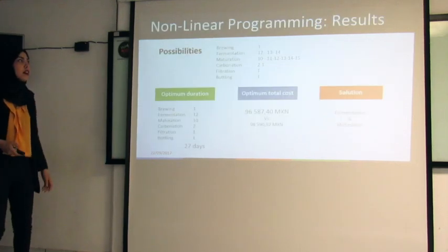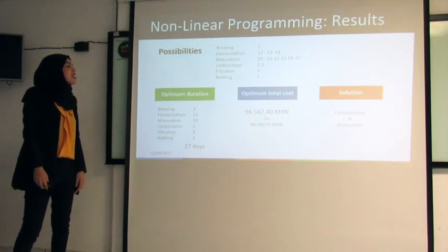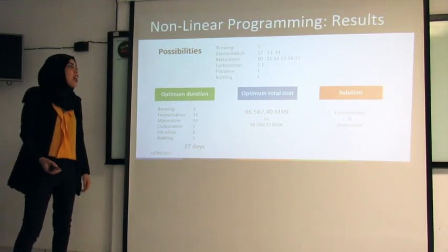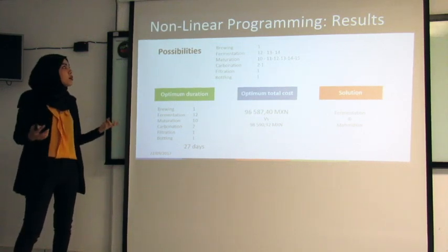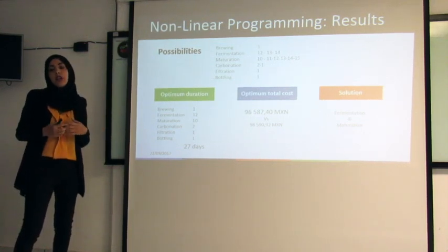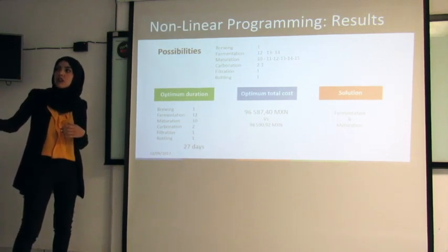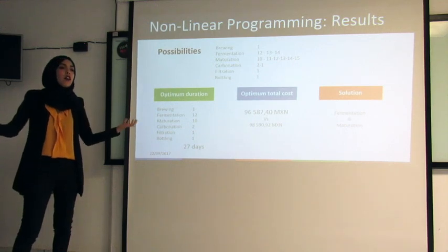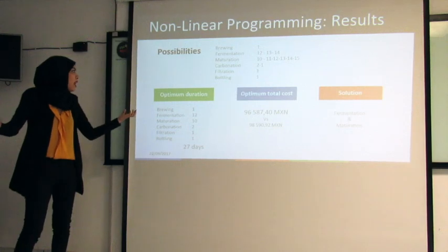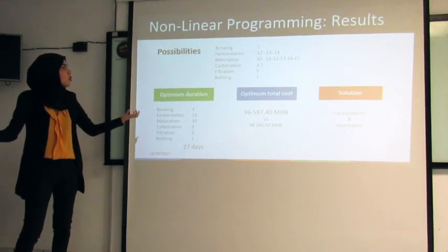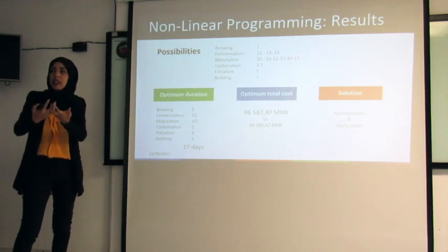On the other hand, to do it as engineers, we used the Solver on Excel, and we've been working on non-linear programming, because here we have an objective function that is minimizing cost, and the constraints are time, and this is non-linear. So we want to have that trade-off, the best combination of these two.